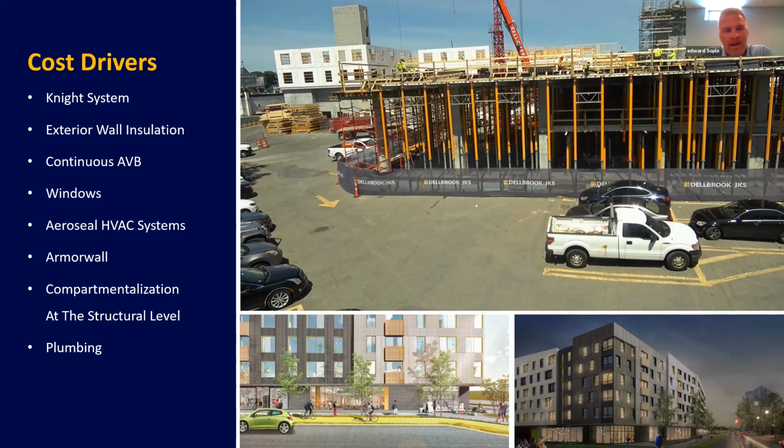A big piece for us on Passive House is the aeroseal of your HVAC systems. Duct leakage testing is going to be a big deal. It's a big deal anyway in normal projects, but with Passive House, the requirements are even stricter and part of the overall success of the job. So we carry it on all projects in general, but it's absolutely a must on Passive House projects.